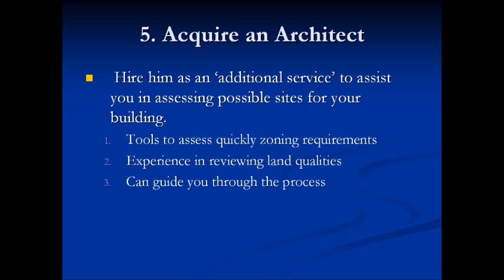As two examples come to mind, easements. If an easement is running through your property, that may extremely limit the amount of building that you can have. And so if you don't know the easements or possible workarounds for the easements, an example would be maybe the foundation of a building needs to be designed to be deeper if there is an easement right in front that could require construction.